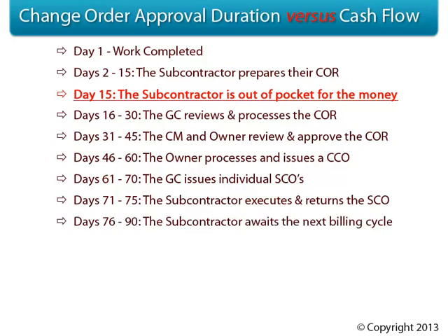Once a subcontract change order is signed and returned to the general contractor, it still doesn't mean the sub gets their money quite yet, but it does mean that the sub can include the value of that change order in their next monthly billing. Of course, each sub is handled individually when it comes to subcontract change orders. Subcontractors don't have to wait for each other as they do in the earlier step of compiling and submitting a change order request to the owner.